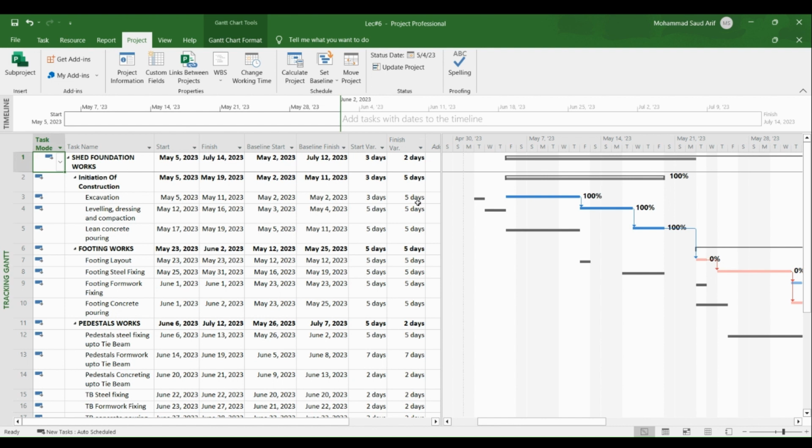And to summarize, the first step is to check the prerequisites before setting the baseline. We need to check if the activities are assigned or not, if the predecessors have been assigned or not, if the calendar has been set or not, and if the resource has been defined and assigned with the cost, and then we proceed with the baseline.